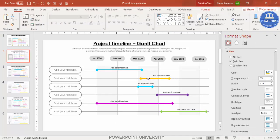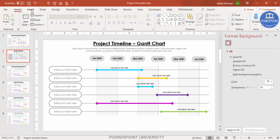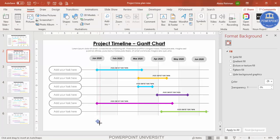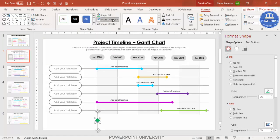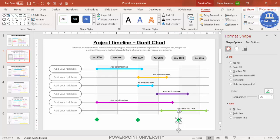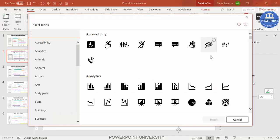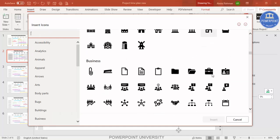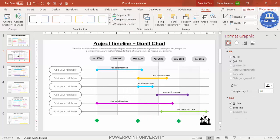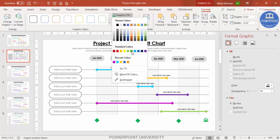You can adjust the timelines to match the months. At the bottom, add milestones. Go to Insert Shapes, select the Diamond from Basic Shapes, and draw one. Give it a green fill and set Shape Outline to no outline. Press Ctrl+D to duplicate for additional milestones — for example, after two months. You can also add icons: go to Insert Icons, search for something like a success or checkmark icon, insert it, and resize it to sit beside the final milestone.